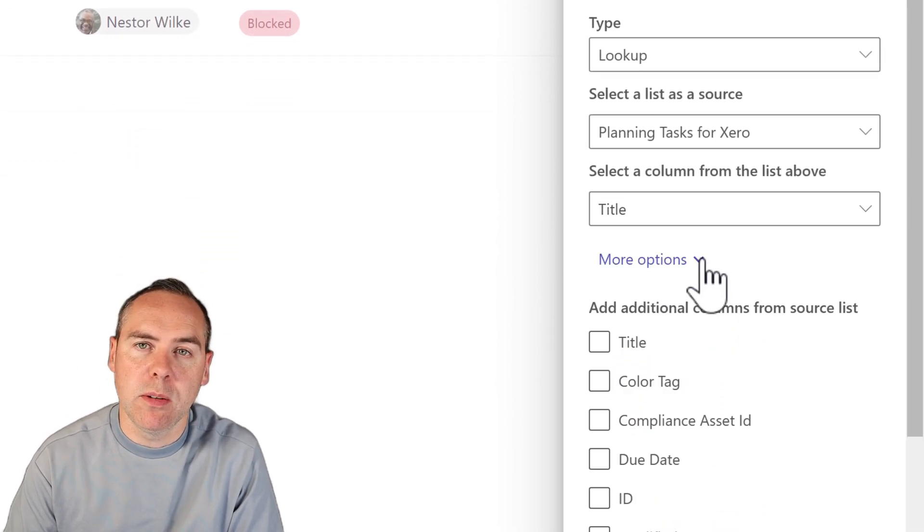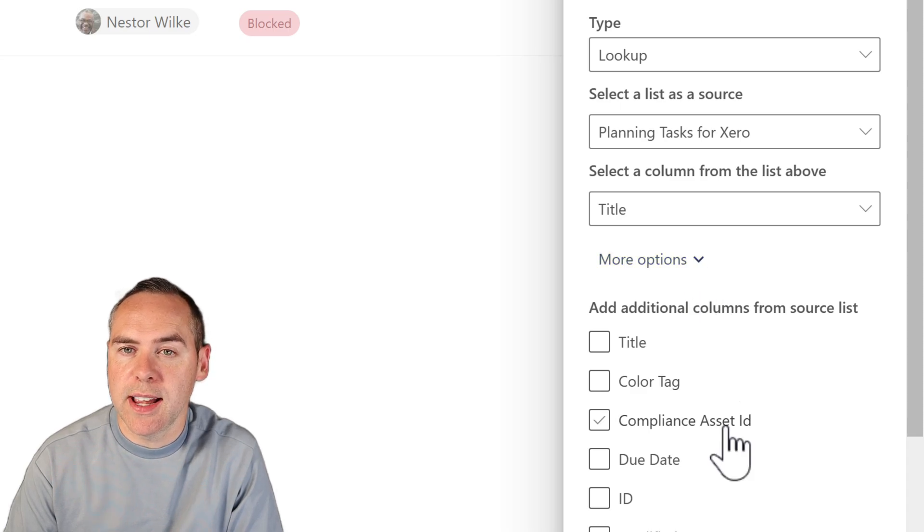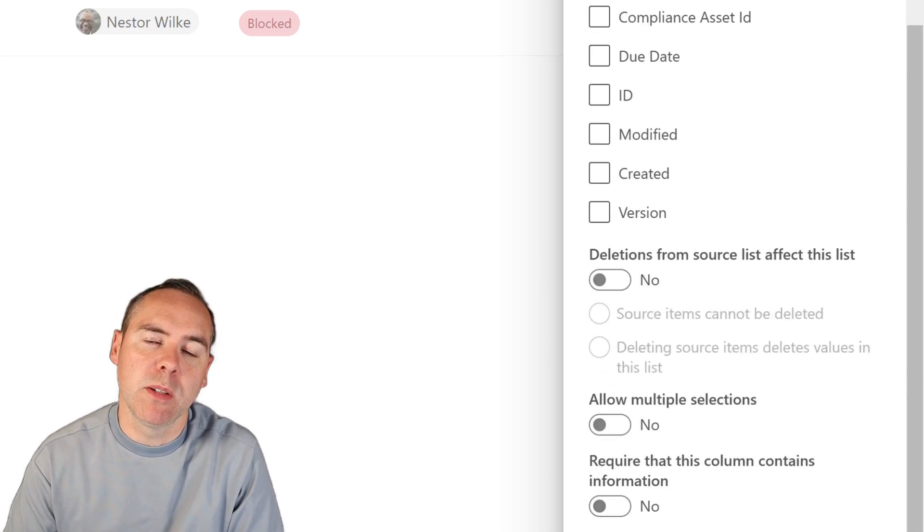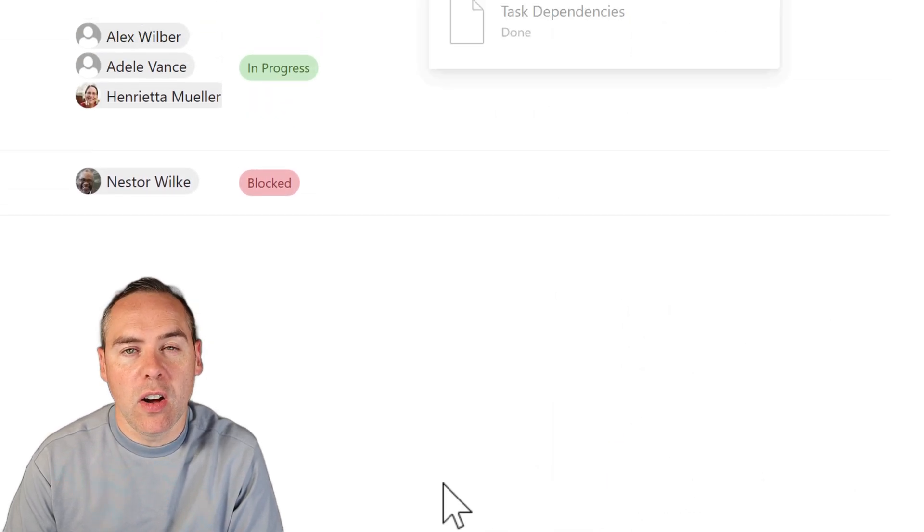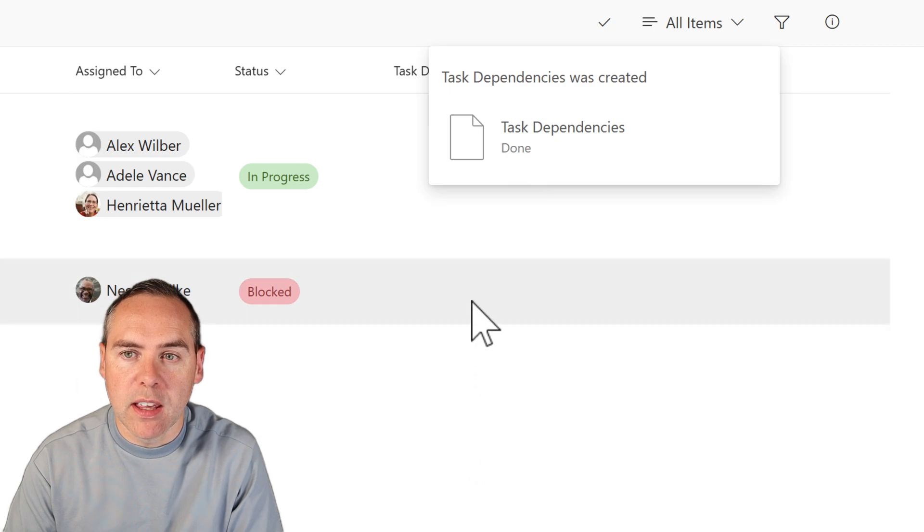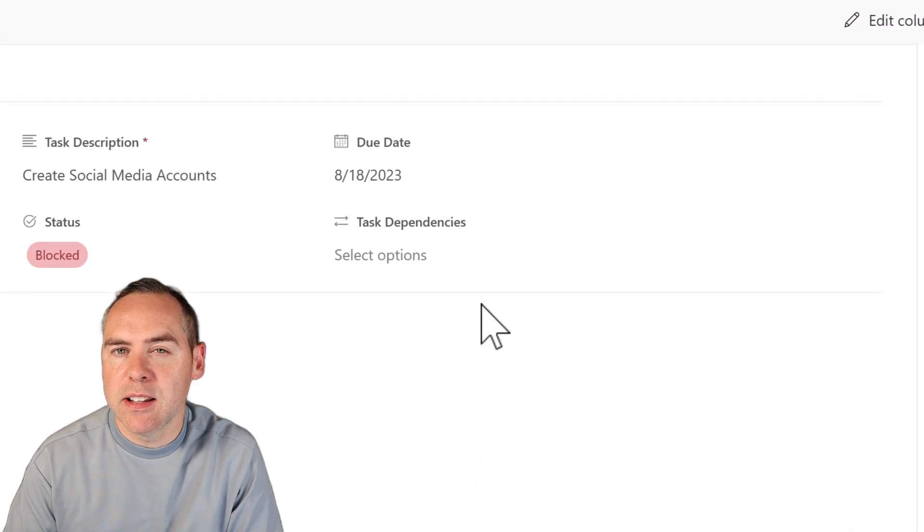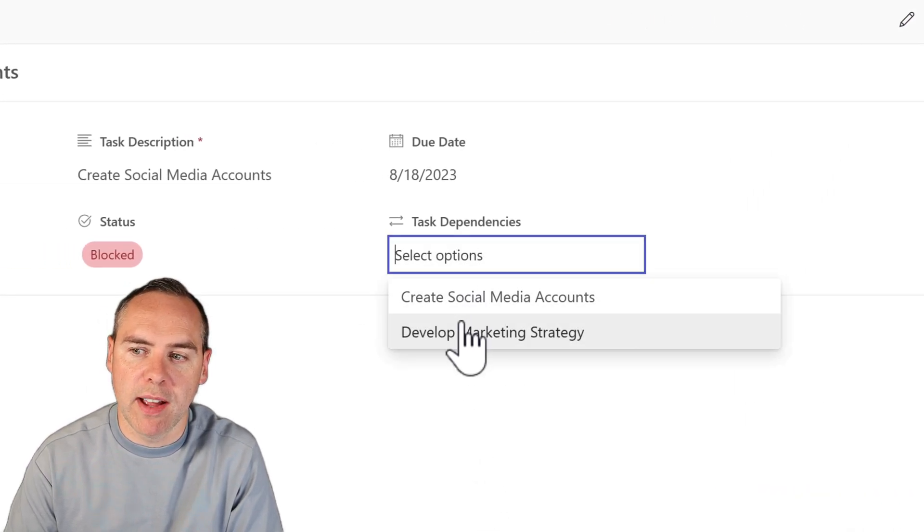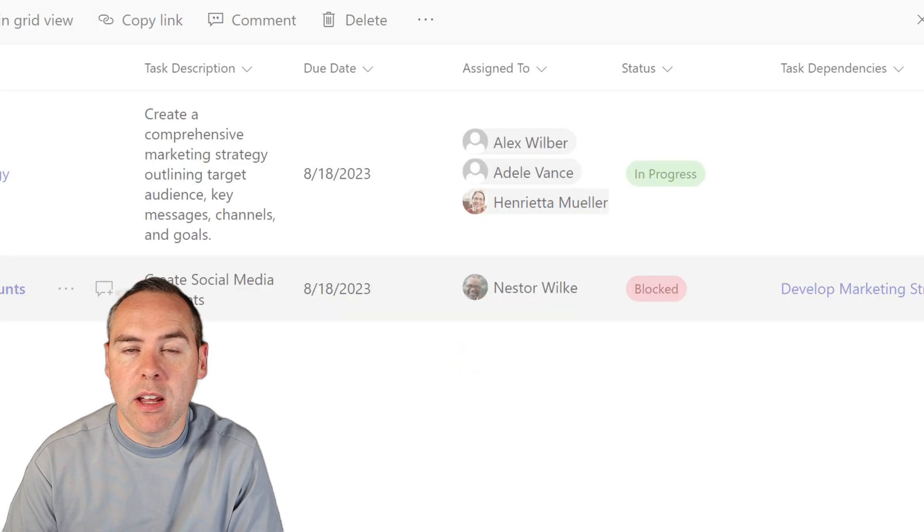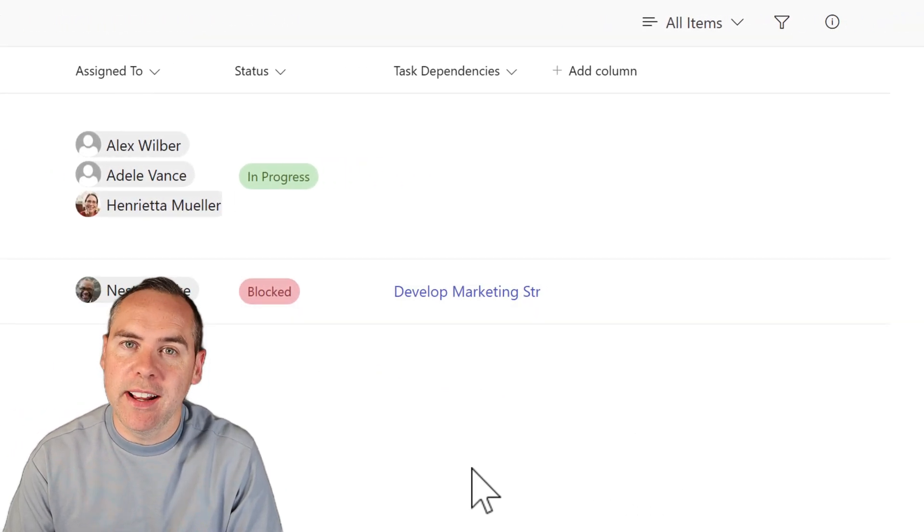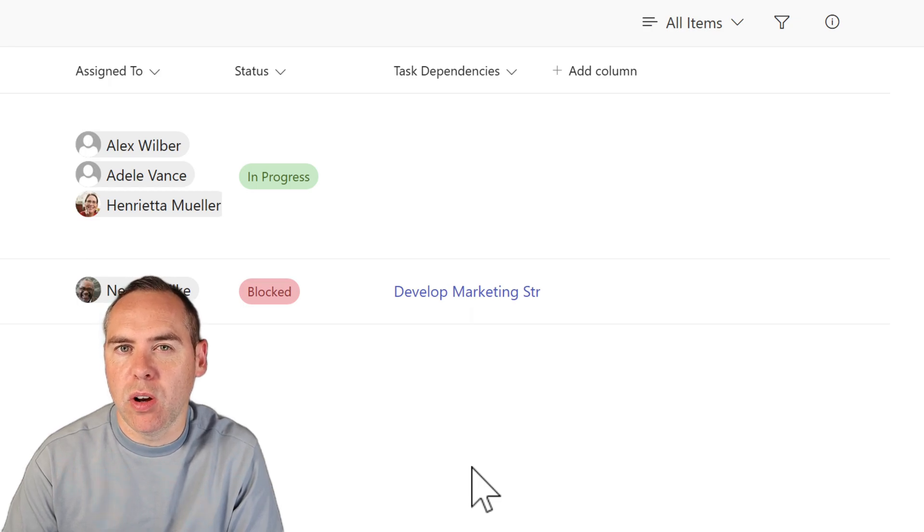Here, I'm going to set it up to connect it to the title, which is our task summary. And I'm going to allow multiple selections from our data set. That now means that when I open this task, I can now set a task dependency, meaning this task has a dependency on the first one inside of our plan. And I can add multiple dependencies, which are all linked and visible inside of our task plan. So a great way to visualize those dependencies.